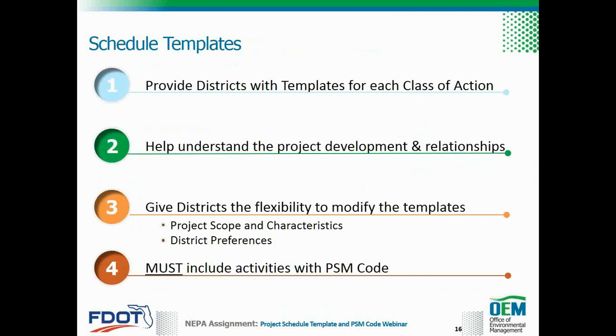code. So there is a PSM code 706 for a Type 2 CE start. Please do not delete this PSM code and decide that you will use notice to proceed activity as a substitute activity for a Type 2 CE start.